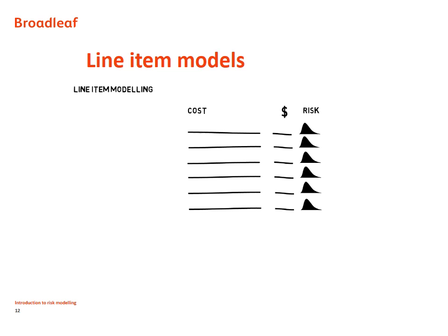The biggest problem is that line items are often correlated in complicated ways, and this is difficult to understand, let alone to model. Say these two lines are both affected by uncertainty about the amount of complexity in the design, which is not yet completed. If it's very complex, they'll both tend to grow, and if it's simpler than we expected, savings might be possible in both costs. The amount of correlation this will cause is difficult to assess, and even more difficult to explain to other people.